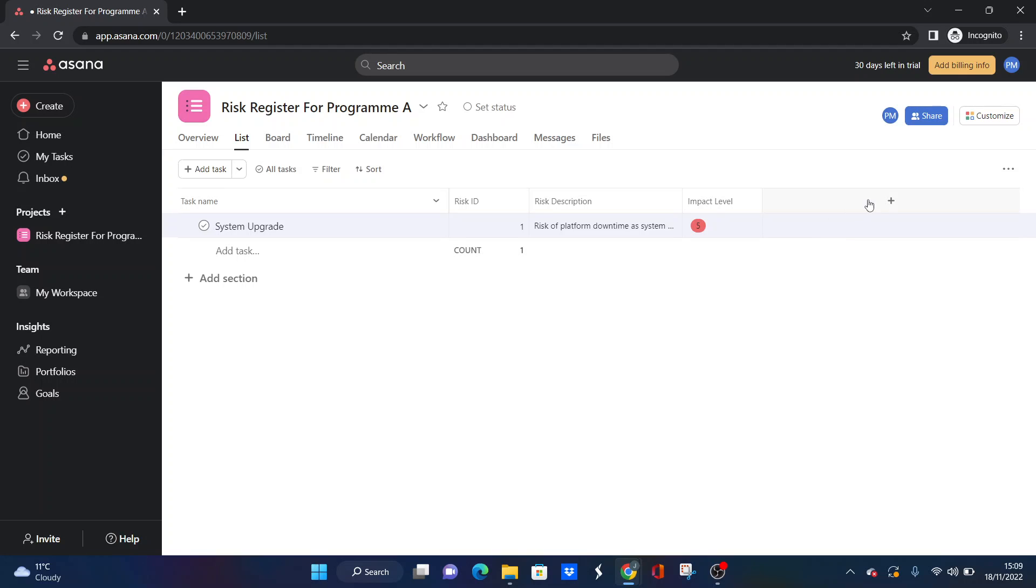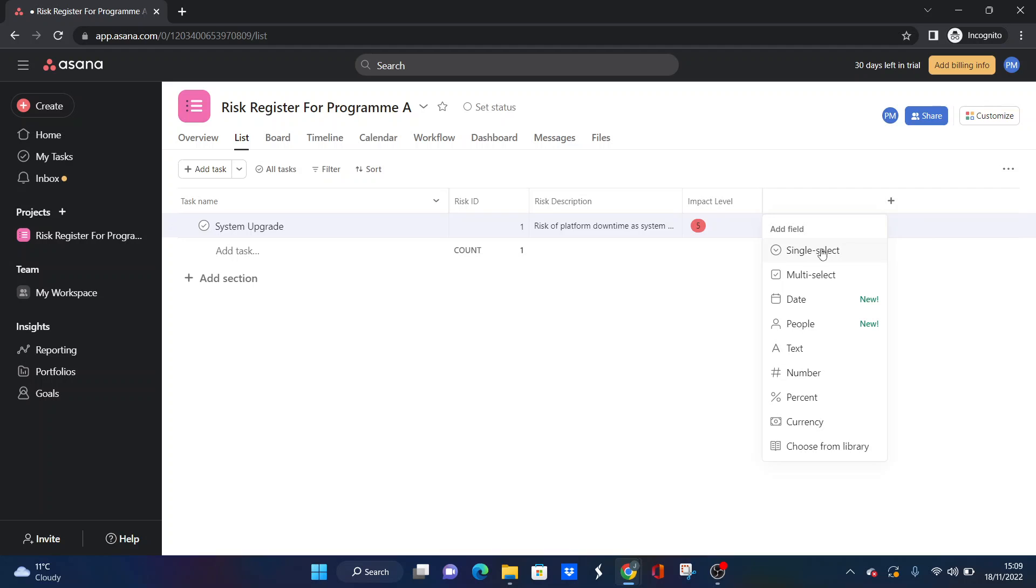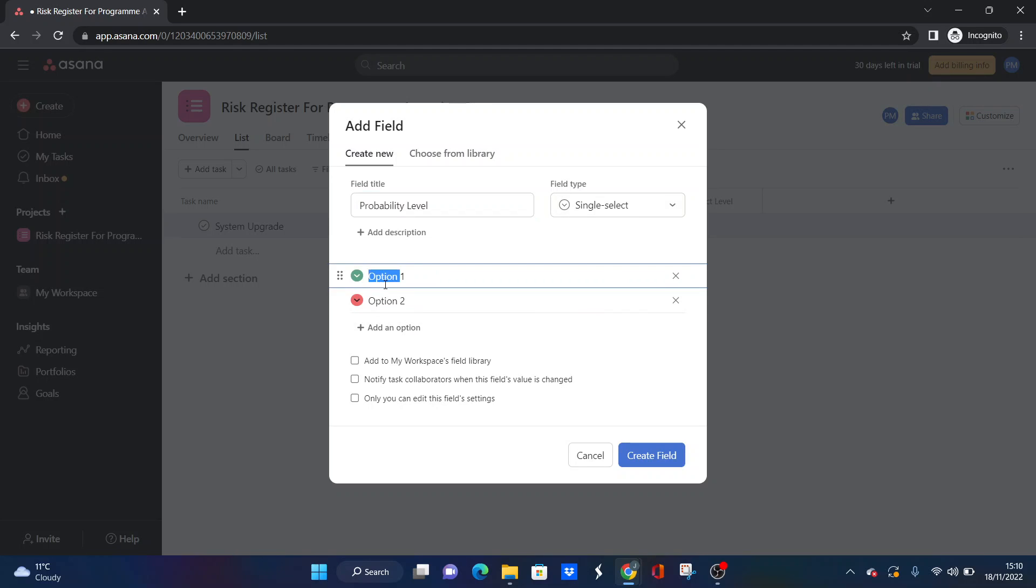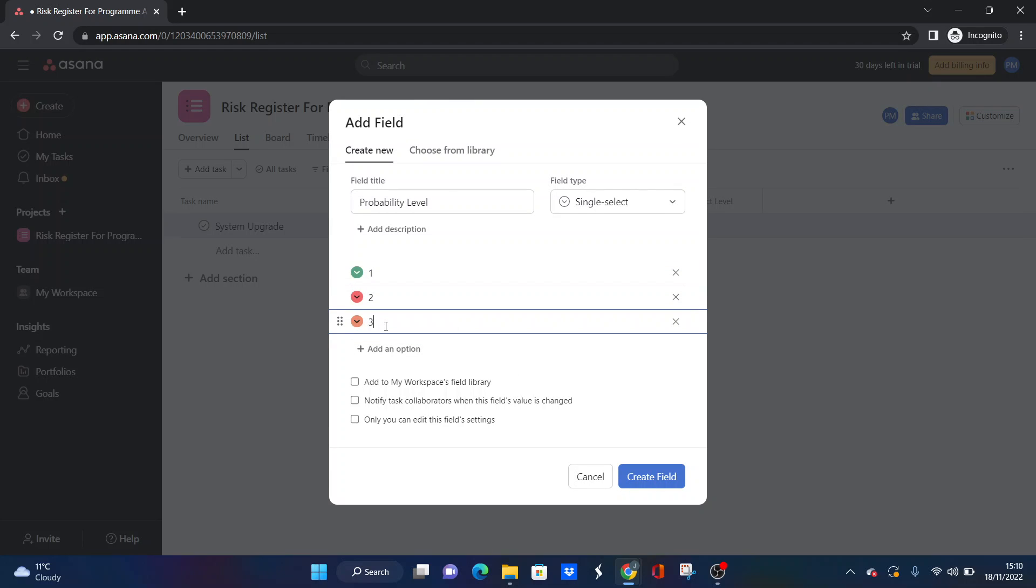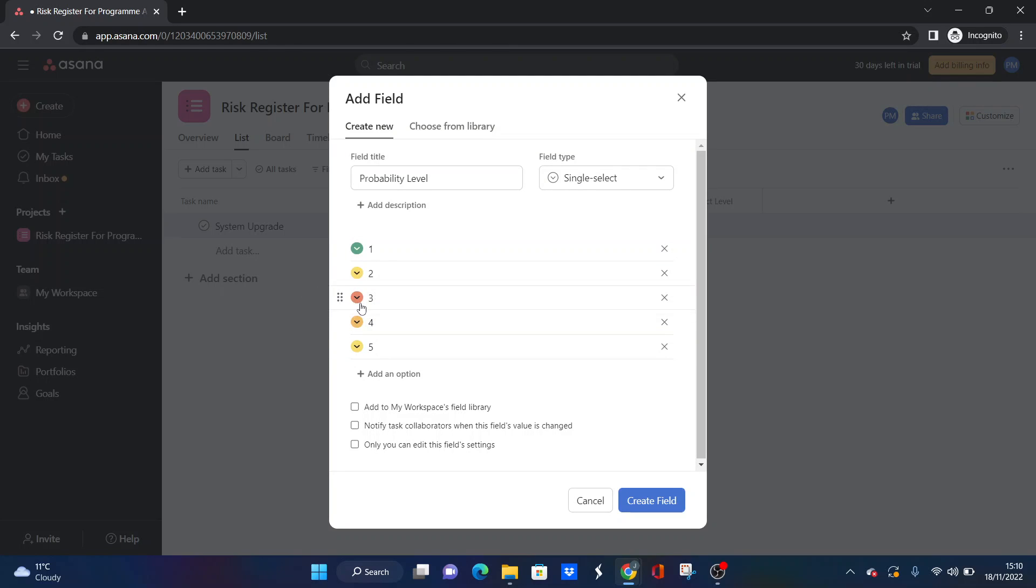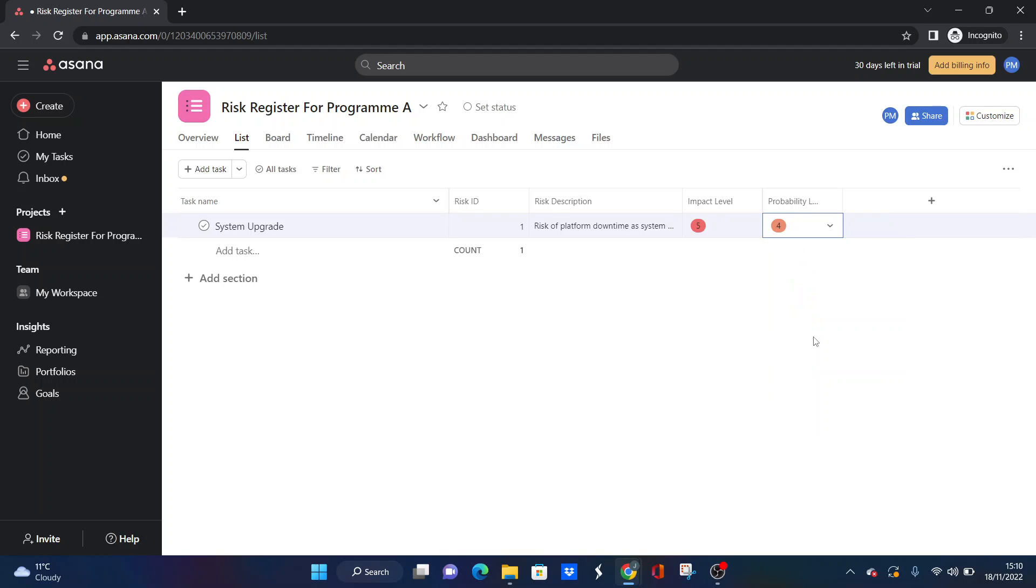Now we're going to do the probability level. What's the chances of this actually happening? We essentially need to create another one to five scale. So what we're going to do is essentially build this out again. So I'm going to go single select, and it's the probability level. And again, we need these five options, the one to five scale. Three, four, and five. And unfortunately, we've just got to quickly go through this again. Hopefully it won't take me as long this time. We'll go there, and then we'll put that as red. And again, this is actually quite likely. The system upgrade, it's a big bit of work, and we're going to say this is quite likely. So we're going to go four. So this is actually quite a big risk in terms of this particular program.